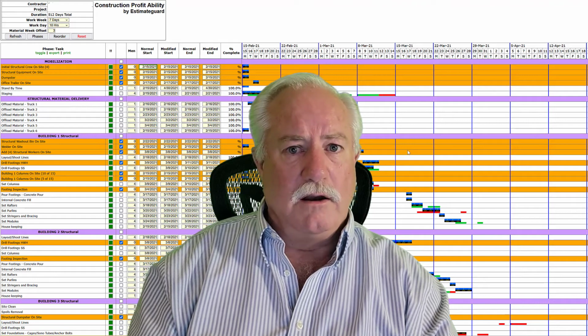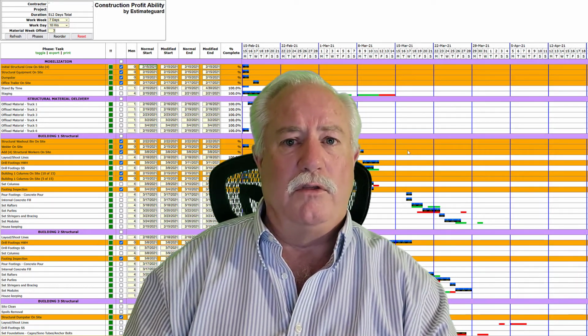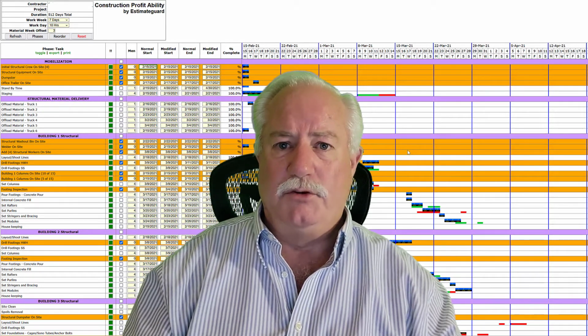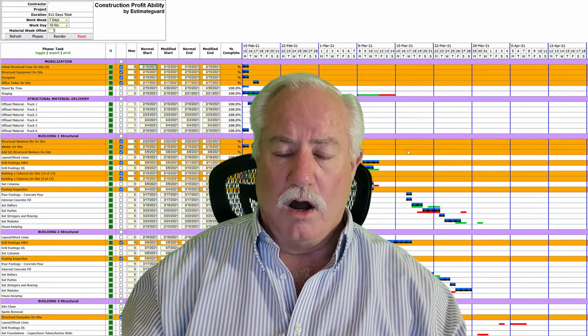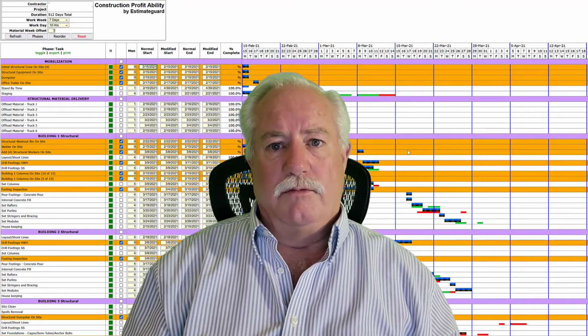So if you can negotiate that pricing up front and just deal with one supplier through the project and just call them and say, here's what we need, and have them ship it out, and then just verify that their pricing is equal to their overall quote, you're going to keep your project moving a lot smoother.